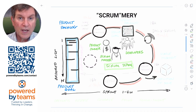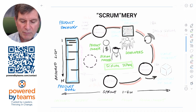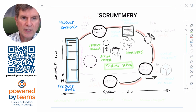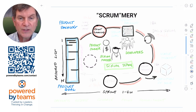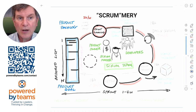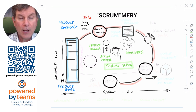A sprint begins with the event known as sprint planning. All of the events have time boxes, but sprint planning only happens once at the beginning of the sprint, so you might scale it with the length of the sprint. The Scrum Guide says sprint planning is up to eight hours for a one-month sprint, which works out to about two hours per week of your sprint length. There are three topics: a why, a what, and a how.